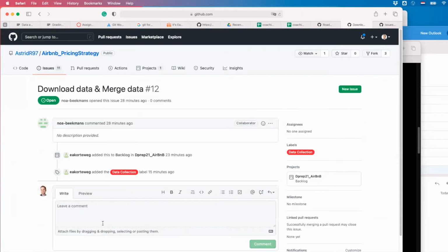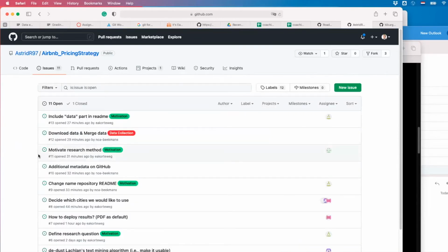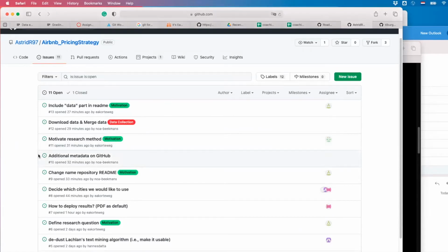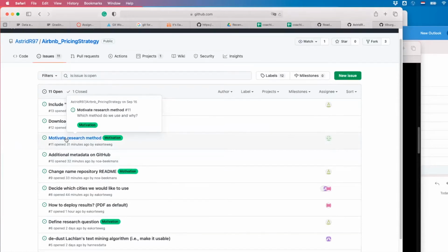See, what I would do is that is super unspecific. It's a big point. So maybe you can break that down into smaller issues. Which data do you want to download? Click on edit and click download this data, download that data, download that data programmatically. And then another issue, merge that script. Don't be afraid of having micro issues. That's exactly what we're going to do. Small bites, chocolate cookies that you can enjoy, but then you're done with it. Right? Noah, does that help? Do you need more examples? Or are you good?